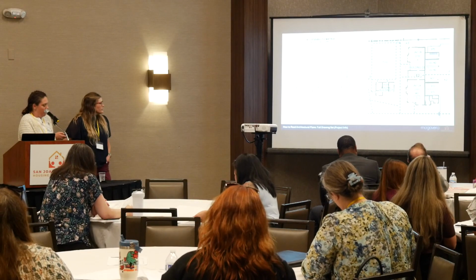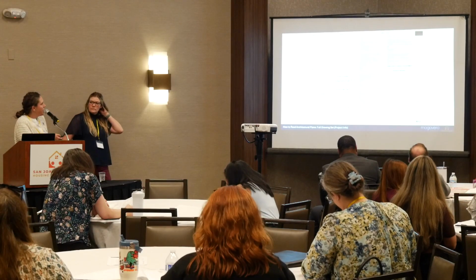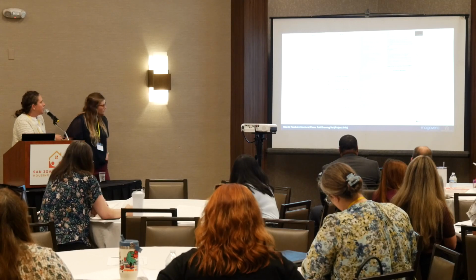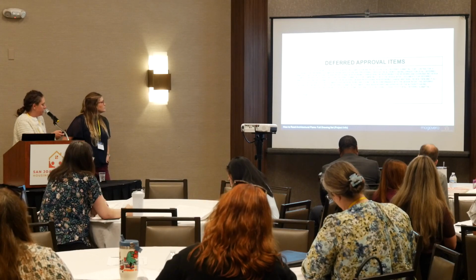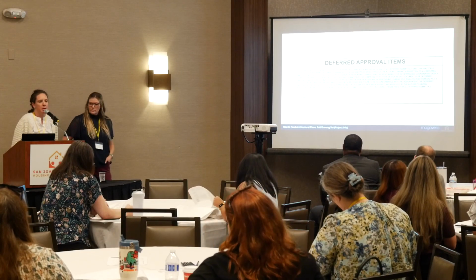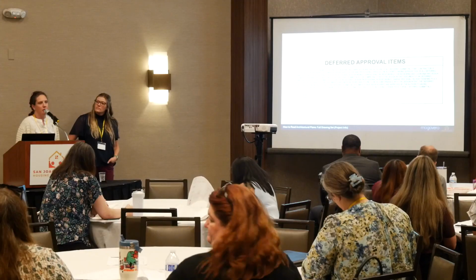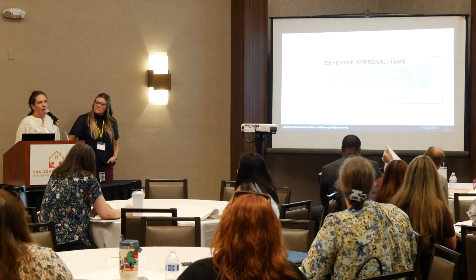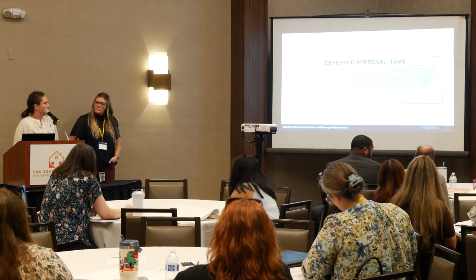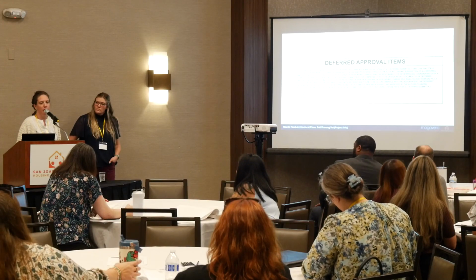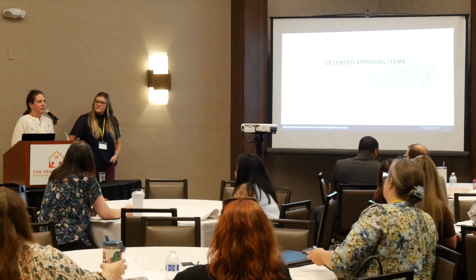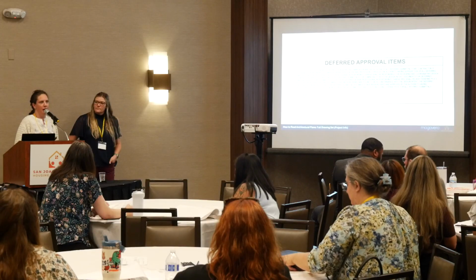And then another thing you'll find in the early pages, along with a bunch of notes and the abbreviations that Allison spoke about, is the deferred approval items. So when we go in for a permit, there'll be things that we are not yet having the city review that'll be deferred items. And some of those are design build things, and oftentimes it's the roof trusses, fire sprinklers, and fire alarm. Solar. Yeah, solar, it seems like less often that's being allowed for.